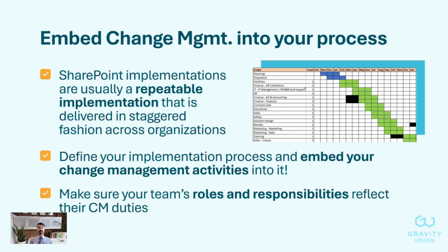So for our example here, for a SharePoint implementation, this is going to be a consistent procedure that we're going to go through with all departments or business units in the organization. It's common for my projects that you will start with a pilot, so you do a couple of groups first, have some success there, then move on and roll out the SharePoint solution to the rest of the organization in a staggered fashion, where at any given time you're working with a few groups and doing their implementation. This might take you a year or a couple of years to execute for a large organization. And so you have this rolling and repeatable process that you're doing.